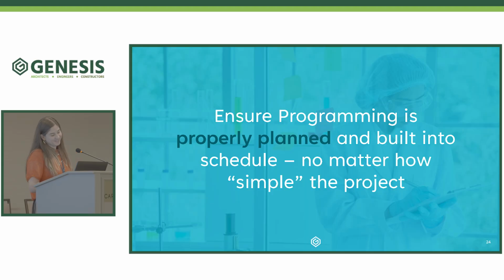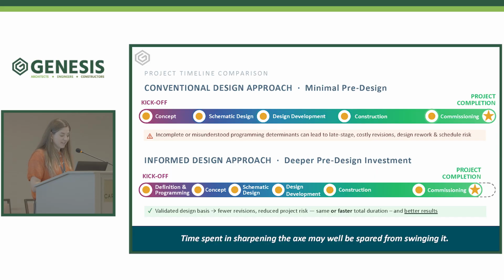So that will bring me to the last thing which I'd like to cover with you today, ensuring that all of this work is properly planned for and built into the schedule. So we have here just two high-level conceptual project timeline comparisons. And when dedicated time to the lab design basis definition and programming is not built in up front, it does cause disruption to the later phases of design when it is more complicated to incorporate and can require rework.